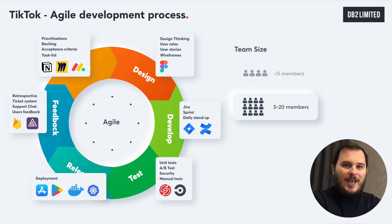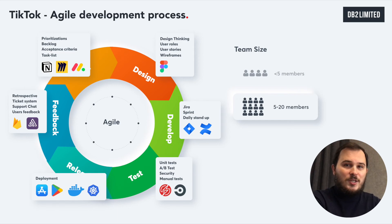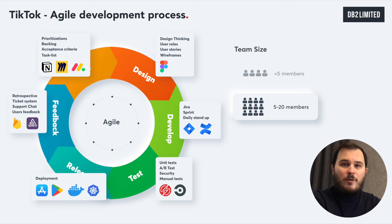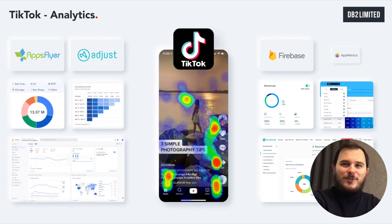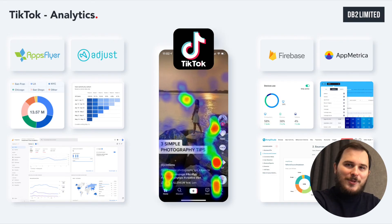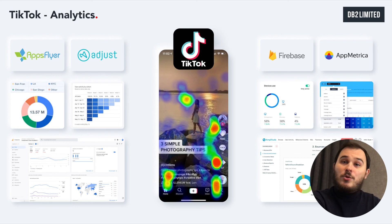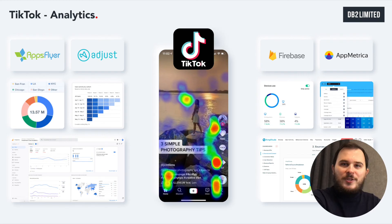To solve these issues you can take the following actions: assign a tech lead to oversee the team, hire a project manager, implement Scrum sprints with backlog and retrospectives, organize daily stand-up meetings with work reports, and implement advanced task management tools like Jira or Asana. And remember, once you've done all this, you can't forget analytics. Analytics tools like Firebase, AppsFlyer, Adjust, AppMetrica, Amplitude, and Flurry allow you to measure how your app is performing — measuring the number of visits, user behaviors, monitoring and analyzing user sessions, and much more. These tools give you the data your business needs to make the right decisions throughout the software development process.